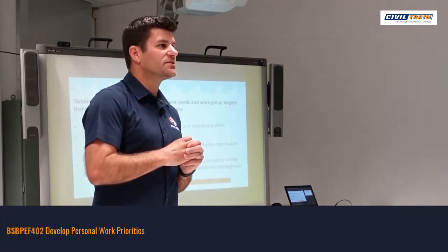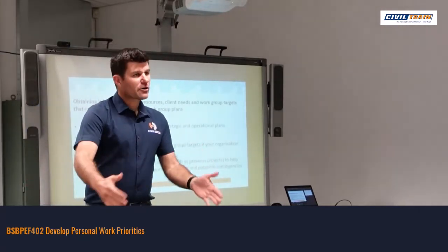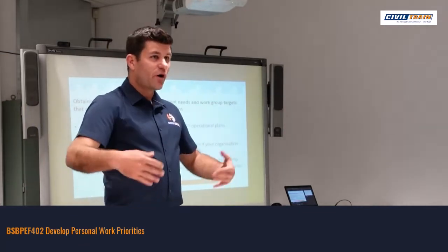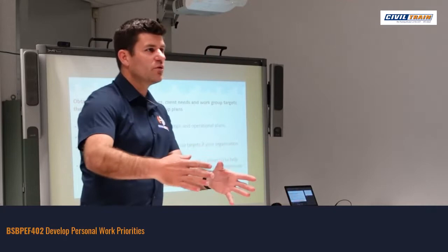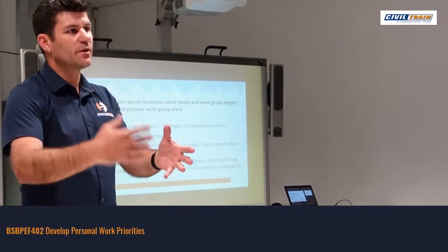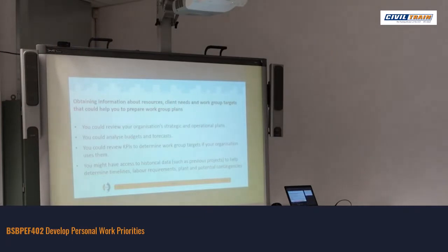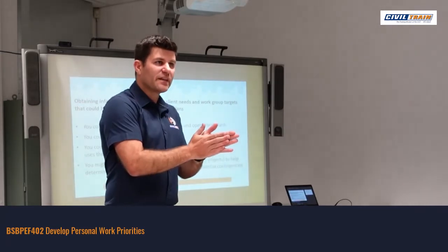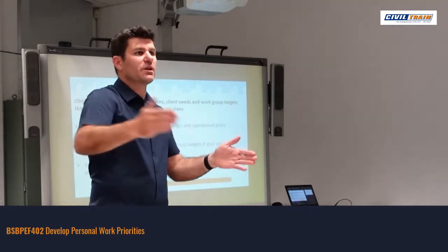And what I mean by dependency is that if I was to say that we're creating a concrete slab on the ground, you start thinking about the steps involved to do that. It might be initial set out, it might be excavation works, formwork, the Forticon plastic, the reinforcement, and you go through all the steps you need to do to get to that finished product. So in a logical sequence, most of the time in your job role you've done that many times, the activities that are required. So naturally in your head you're putting that sequence in place.